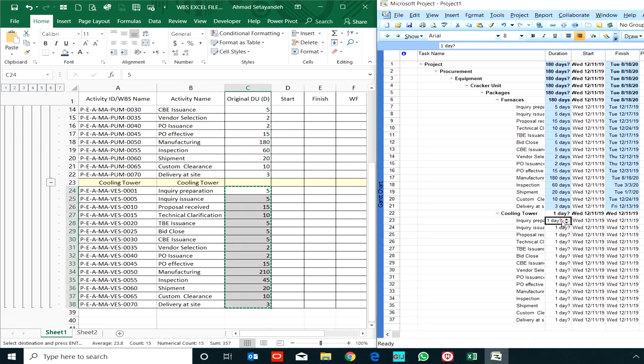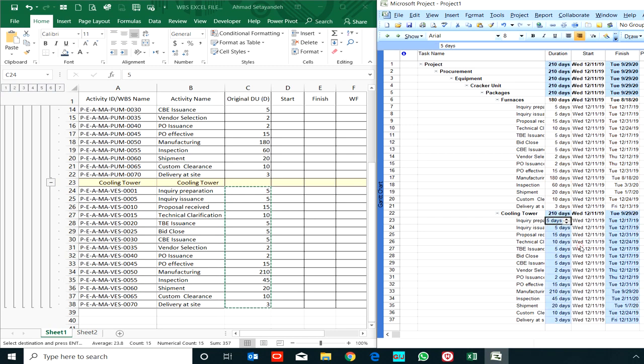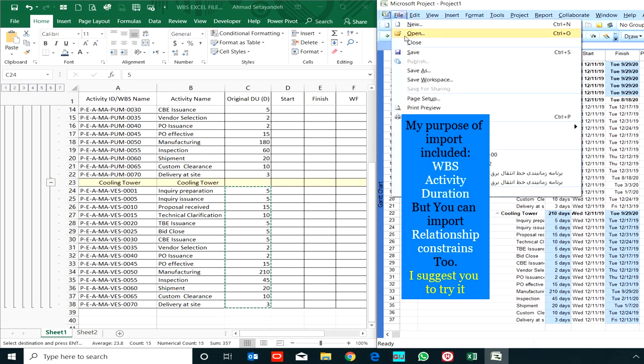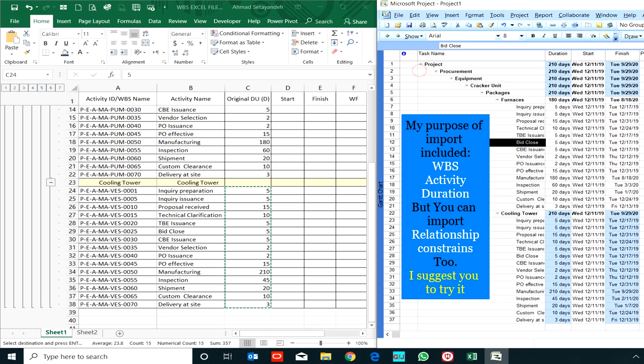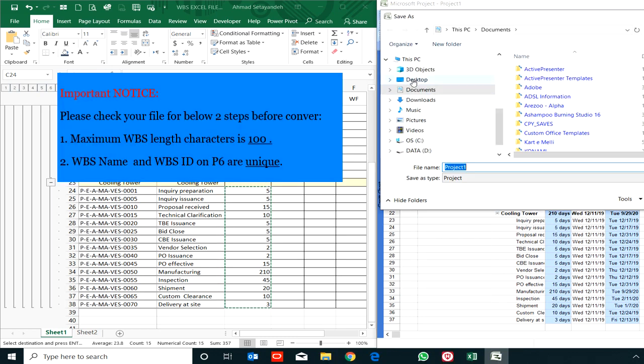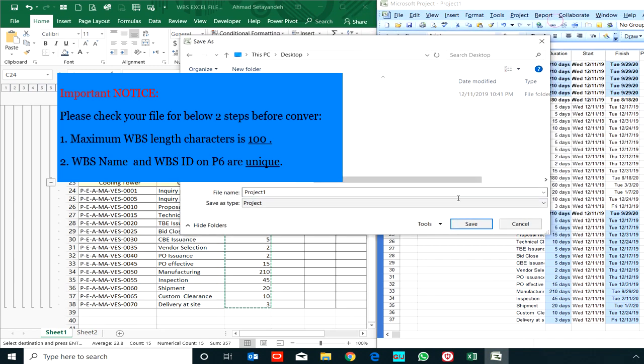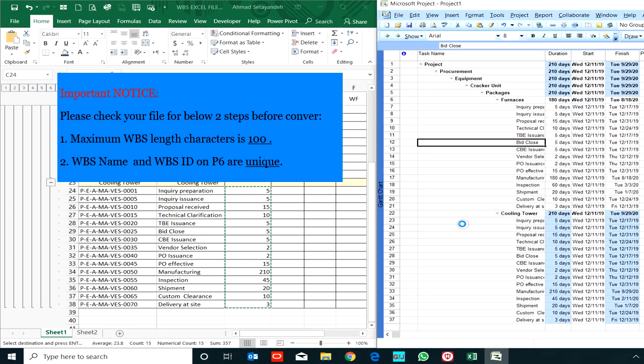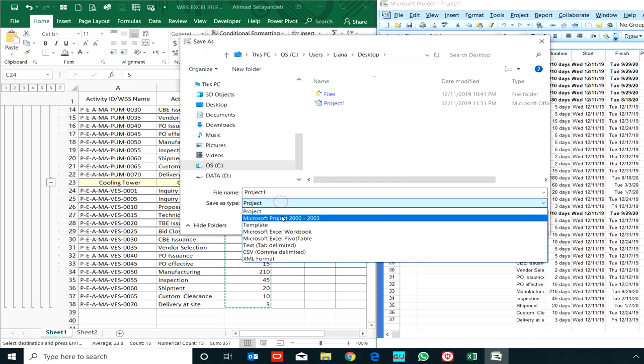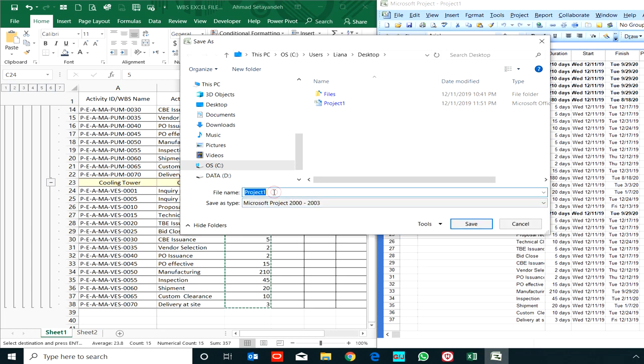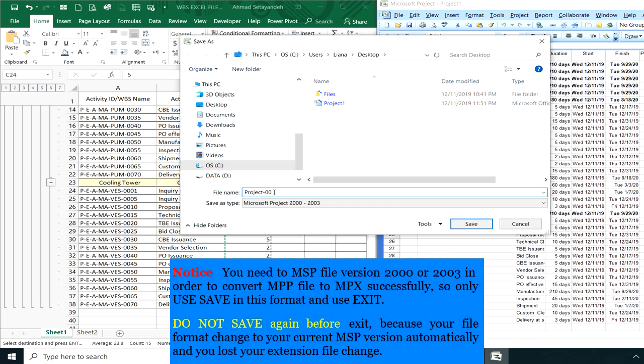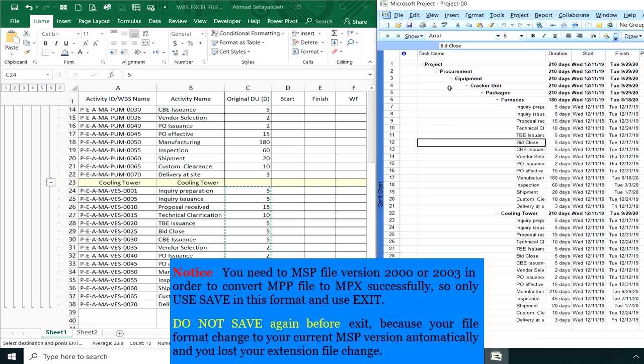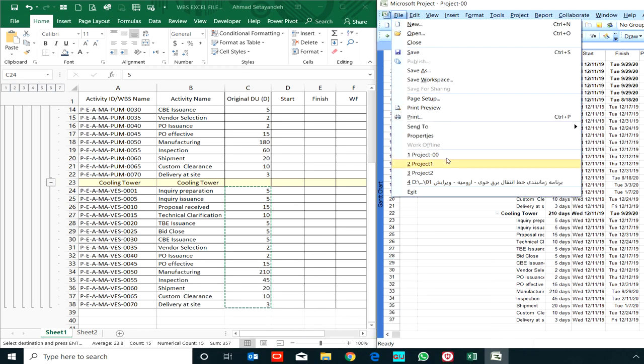In this worksheet I only want to import WBS, activity name, and duration, so the file is completed. I save my project to my desktop and save it again with the format of Project 2000 or 2003. Be careful—if after this save you push the save button again, your MSP will not retain your format and it will change to 2007, so do not save your file again. Exit it.